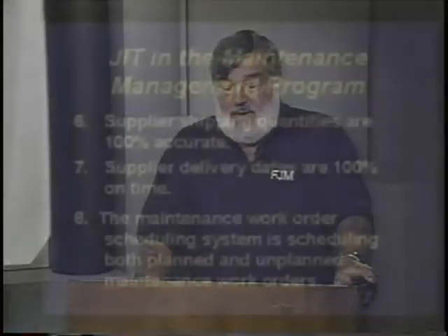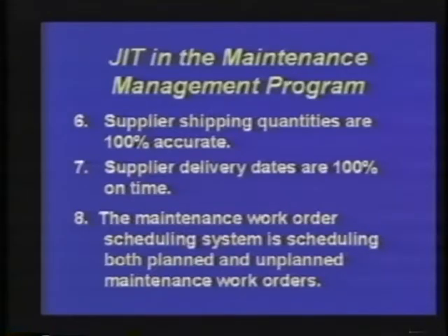The maintenance work order planning and scheduling system is planning and scheduling both planned and unplanned maintenance work orders. Now, how can I schedule unplanned maintenance work orders? If you took the maintenance work order requests, which are unplanned, and converted those over into, let's say, scheduled work orders, and you could prioritize those scheduled unplanned work orders, you'll be able to schedule close to 99% of all maintenance work order requirements.